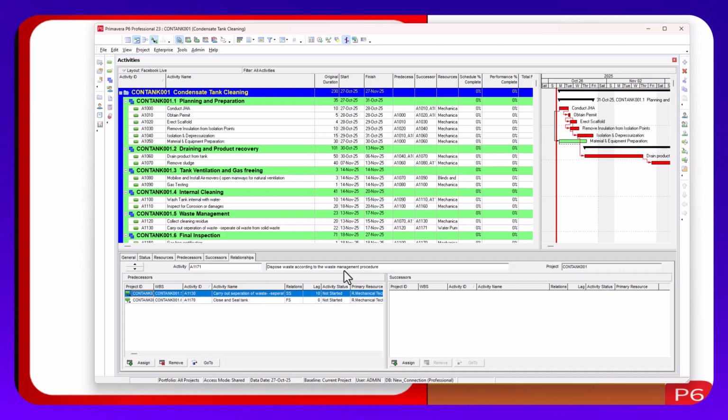Then also review holidays and weather days before scheduling. Review holidays: which days are holidays? After putting them in, you just refresh and check. From here, you see this Gantt area showing you the days that are work days.